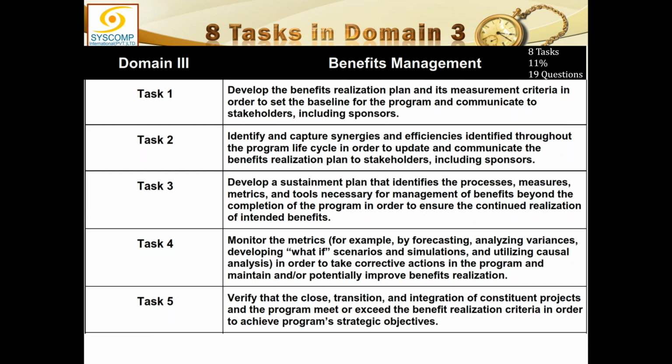You see, scope, time, and cost. We had the scope management plan, schedule management plan, and cost management plan, I'm talking about project management. And ultimately, we had the baselines: scope baseline, schedule baseline, and cost baseline. These are the implementable forms. The baselines were the implementable forms which were to be executed in execution, right? But the management plans were just the guidelines.